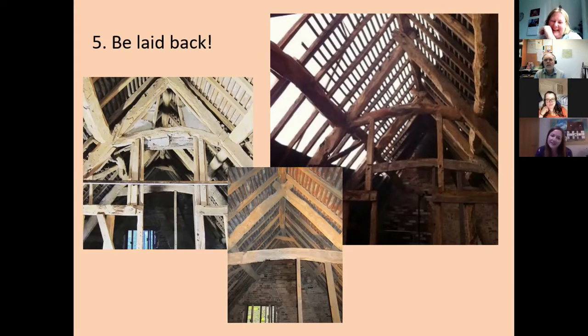Yeah, so that's an illustration of how the house obviously looked like a house when we bought it. And then the more you remove, suddenly you've got a structure that isn't sound, or a huge problem with woodworm or something that's just hidden under the surface. So obviously the house didn't look like that when we bought it, but the more we stripped back and uncovered things, the more money you need to find to spend to put them right. So yeah, that does happen.